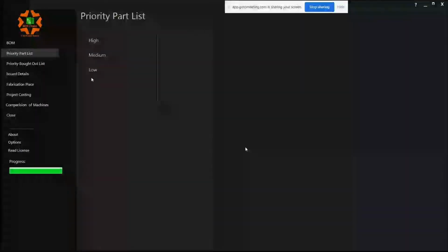So every manufacturing component has its own manufacturing lead time. When I say manufacturing lead time, what does it mean? If I release a drawing today, there is a component which could be made in say 20 days from the date of drawing release. There is a component in the machine which could be made in say 5 days from the date of drawing release. And there is a component which takes 2 days to get manufactured from the date of drawing release, right? So every manufacturing component has its own manufacturing lead time.